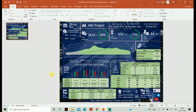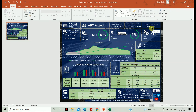Let's understand the upper part of the dashboard — it represents the general information of your project: your reporting date, project name, start date, RERA completion date, project completion date, and the delays in your project. On the second line, you will find the planned value and actual value — this is the financial status of your project.